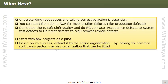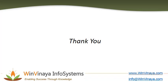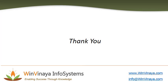Understanding RCA and taking corrective action is important in software development. The results can be used immediately or documented as lessons learned for other projects. Start by doing RCA for major production defects, but it's good practice to also apply RCA to user acceptance testing defects, system testing defects, unit testing defects, and requirement review defects. Start with a few projects as a pilot; if successful, apply to the entire organization.